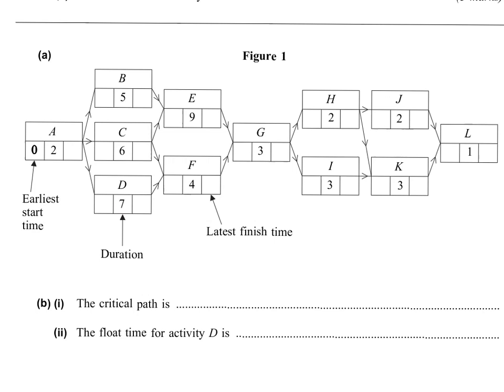This diagram tells us that we have to start task A before anything else, and tasks B, C, and D cannot start until A is completely finished. As you can see, the left-hand side box is the earliest start time, and the middle box is the duration of each task.